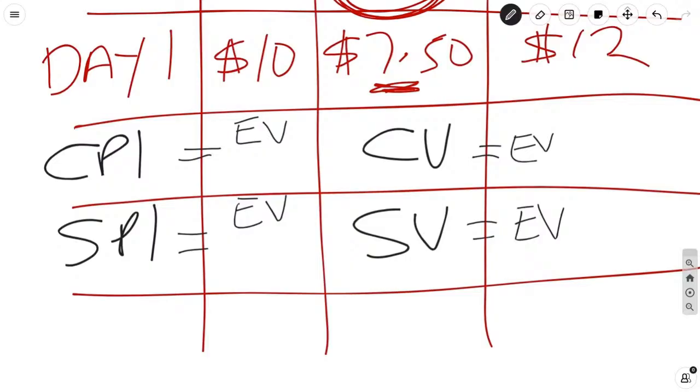If we are talking about an index, we are surely going to divide. You know that from basic maths, those of you who recall. Indices are always something divided by something else. For variances, it is always one number minus another. So for the indices, we divide. For the variances, we subtract.